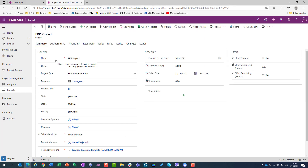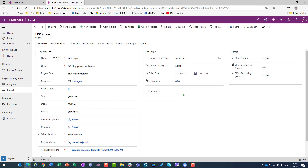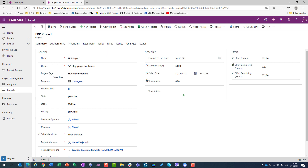Whenever you want to change your choices, you can do it through tables or choices. But be very careful: if you delete a choice — for example, if someone deletes a project type that is currently assigned to a project — that value will be deleted from your project as well, and you may lose information. So do not delete your choices often, and before you do, make sure the choice is not being used in any project, program, or project request. On the other hand, you can add or modify choices whenever it seems appropriate.